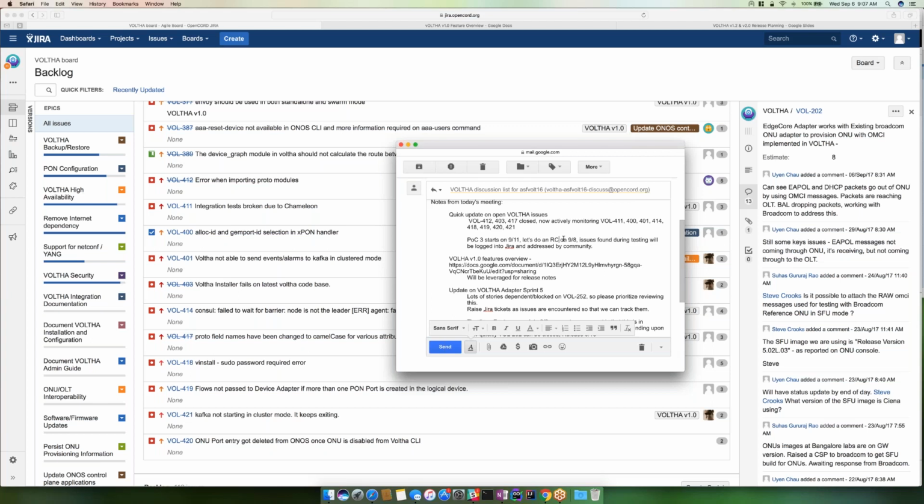Yeah, that seems to make more sense: rather than forcing a 1.0 milestone prior to POC3, we wait until the adapter is done and roll that out with all the critical bug fixes identified by then, and call that 1.0. Chances are that's going to come out towards the end of September, realistically. So that has impact on POC3.